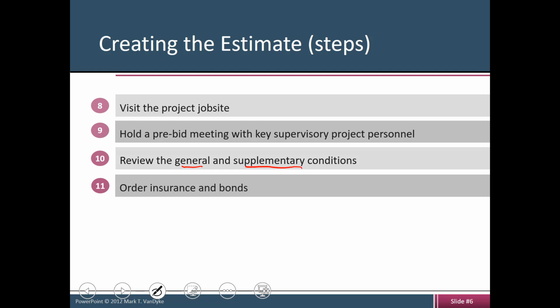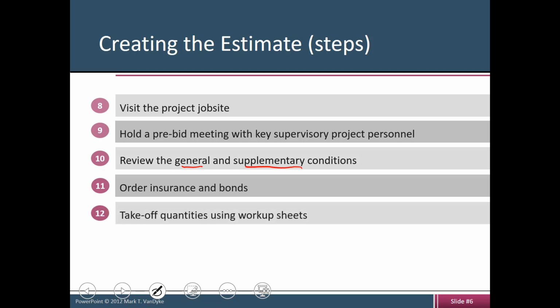Order your insurance and bonds early before you get in, because this is a time consuming task. So before it's late, make sure that you order your insurance, make sure you order your bonds and things like that. And then step 12 our dear friend, quantity takeoff. So make sure that you do quantity takeoff. Guys, that's something that I'm actually going to talk more about, and a lot about actually throughout this semester.